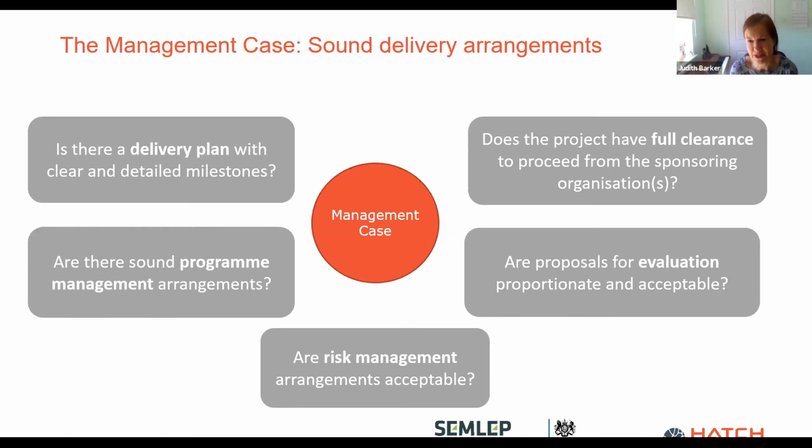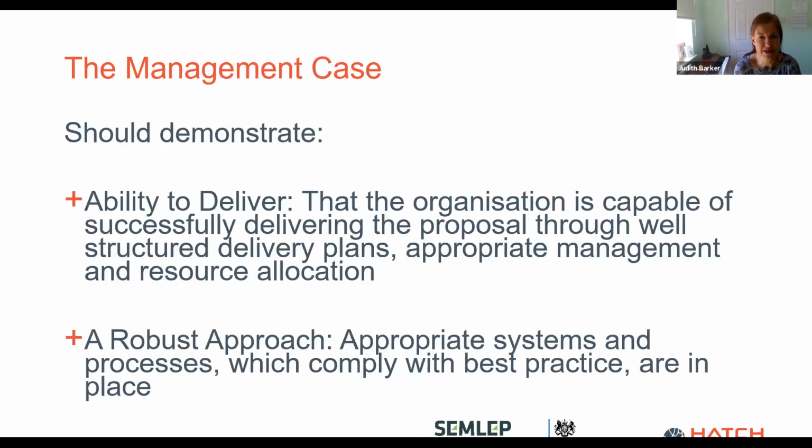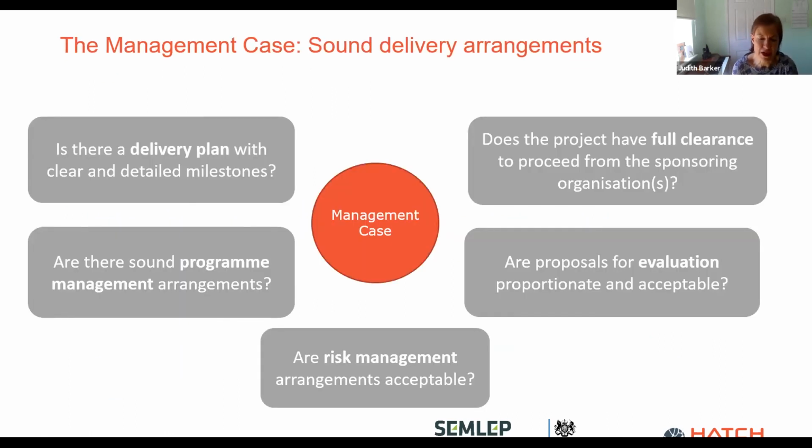It fits within the timescales of the funding, and that you have the experience of doing this kind of work. So that's really key. I think one of the things that I always focus on in this management case is the risk management. What experience have the people running the project got, and what have they said about their risk management arrangements? So the risk register itself is a really powerful tool for understanding the analysis that's gone on behind the project. And that is important because that feeds back into the financial case.